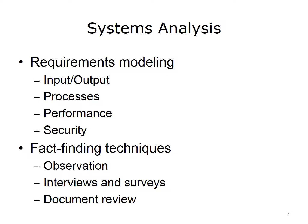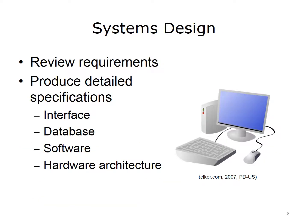Requirements need to be documented, actionable, measurable, testable, and defined at a level of detail sufficient for system design. The objective of the systems design stage is to determine system specifications that would satisfy all requirements formulated during the previous stage. Systems design starts with a review of the system requirements, then different system components are designed. Those include the system interface, its database, software, and hardware architecture. The deliverable of this stage is a blueprint for building the new system.